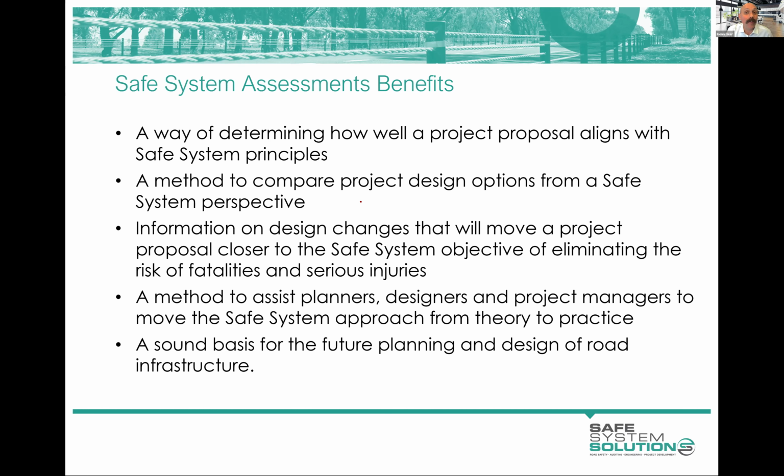And so that's actually one reason why safe system assessments are quite popular, and people get excited by them at the optioneering phase, at those early stages of infrastructure projects where they've got some ideas and designs on the table. They can factor in safe system alignment with their impact on traffic and with the cost, so your multi-criteria assessment becomes richer and more vibrant, and takes into account safety and safe system alignment. Whereas before there wasn't anything really quantifiable, and you'd just say, yeah, they'll all be built to standards, so safety is fine, and off you go.